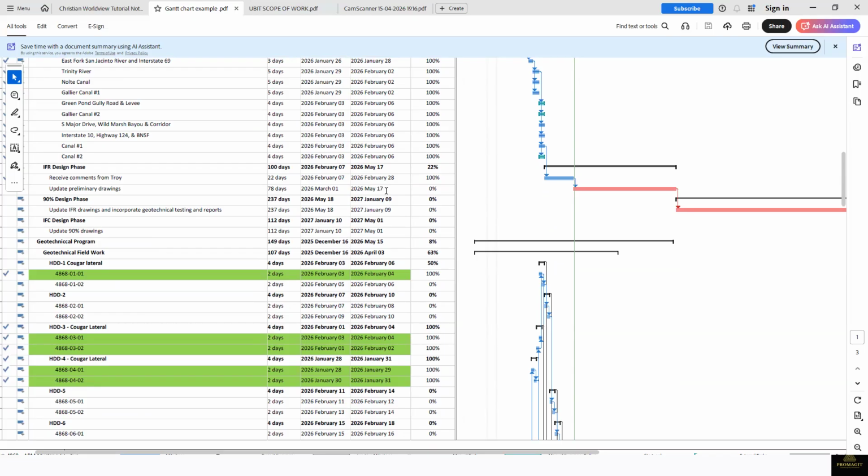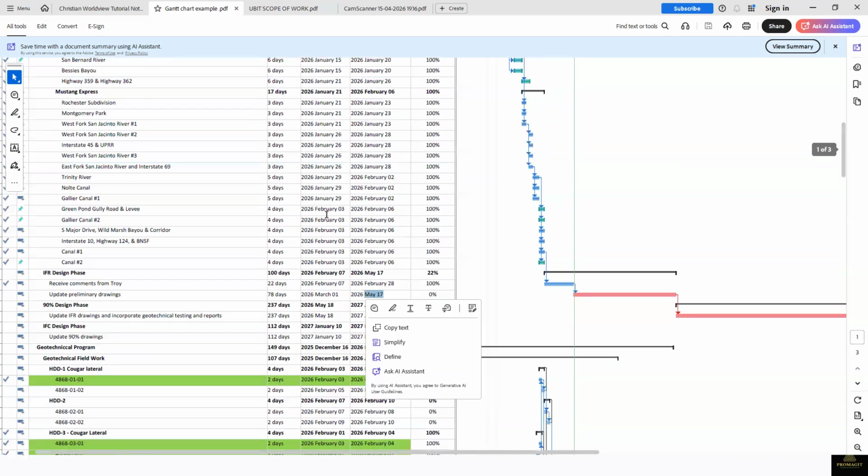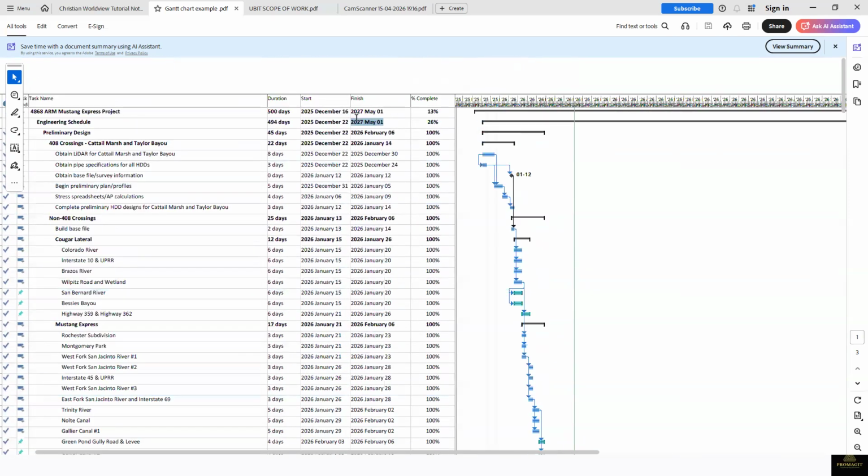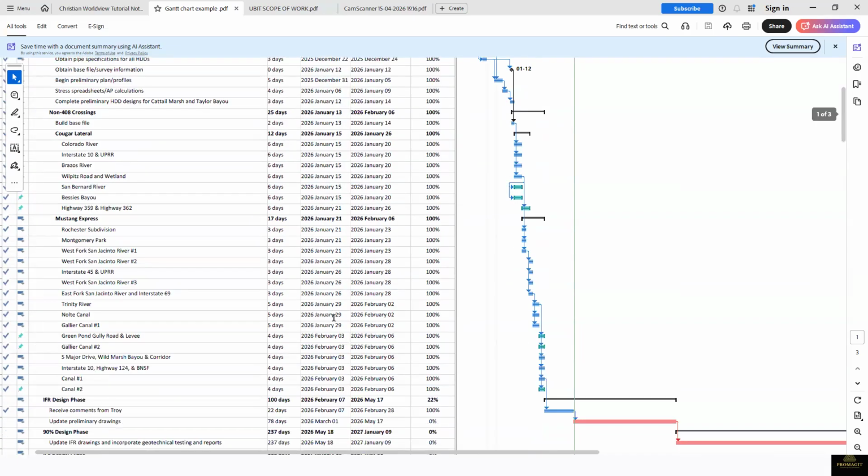Of course, we're not finishing March. So basically, that date you have to move, to show when the new completion date is going to be. Automatically, it depends if the activity is on the critical path. Definitely it will affect this particular date. If not, it won't affect it, and that's why schedule is really important.